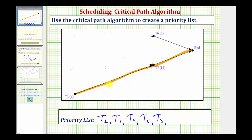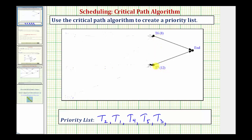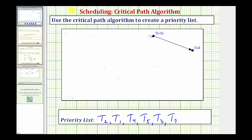Now we eliminate task three from the digraph and repeat. We only have two tasks left to consider — task seven and task six. Task seven takes longer, at 12 hours, so the next task on the priority list is task seven. Then we eliminate task seven from the digraph, which leaves only task six. With only one path remaining, task six is the last task on our priority list.